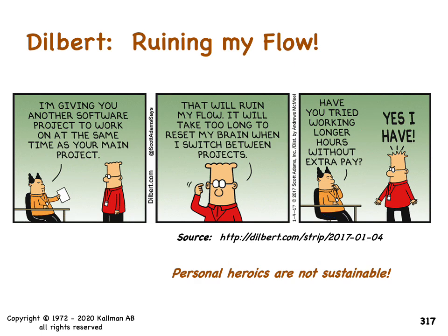And so it is a strategy of executives to overload the system. They call it pressurizing the system. And if you work in a matrix organization where you're assigned to multiple projects at the same time, that's not going to be a good situation because you're going to lose your focus and you're not going to be able to deliver.